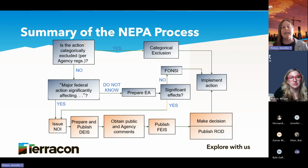It's basically, it can be anyone. So if you have 2 agencies, say the Army Corps and the FAA, whoever wants to take responsibility for doing the consultation with the tribes, who wants to take responsibility for signing that document and making sure that it's fitting their standards, they're the ones who raise their hand. Typically it's the ones who have more federal requirements, like, hey, you're getting our money, but it's on your land, so we're going to be the federal lead. It kind of has to be a meeting of the minds, meeting in the middle of who wants to take on that ownership.